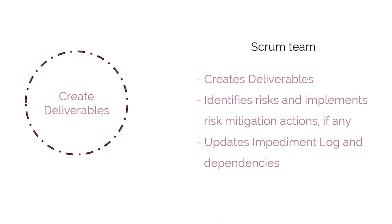For instance, during the Create Deliverables process, the Scrum Team creates deliverables, identifies risks, and implements risk mitigation actions, if any, and updates the impediment log and dependencies.